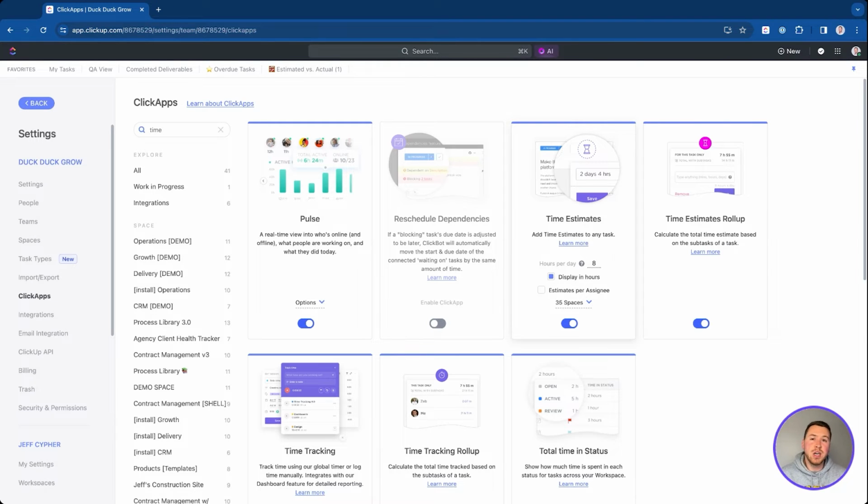That might seem good, but unfortunately, with this turned on, what that does then is it takes the time estimate, it applies it to me. So if I were to be on that, I get the hour assigned to me. I can also edit that too. So if maybe I'm doing a little bit more work on that task, an hour and 5 minutes, an hour and 10 minutes, for someone else that's maybe just doing 50 minutes, I can customize that. But with this, if I then take myself and unassign myself and maybe reassign someone, that time estimate is going to come with me. So essentially it's going to disappear from that task. So just take note of that if you do turn that on.